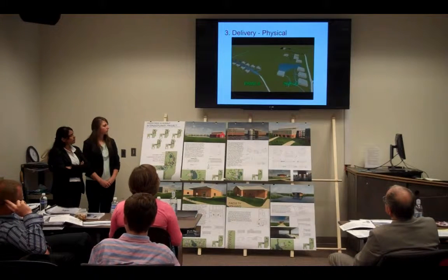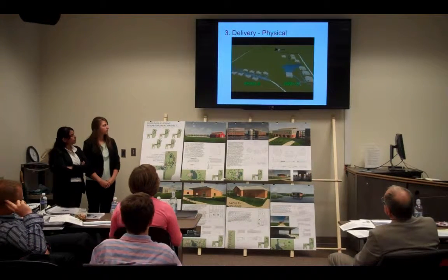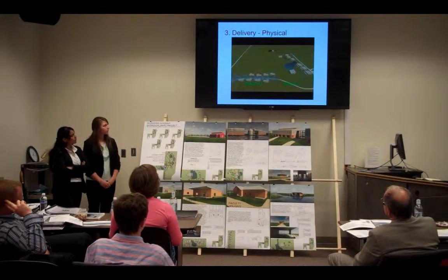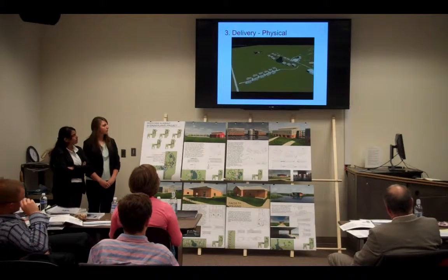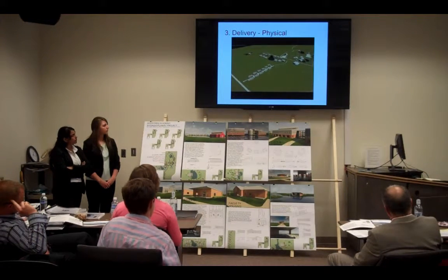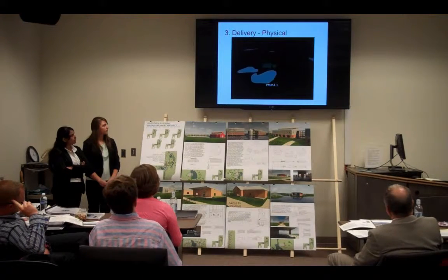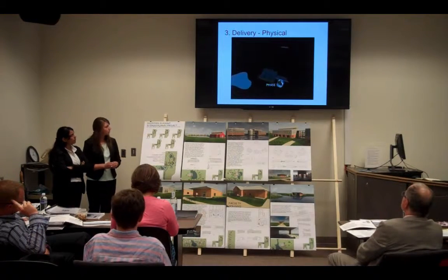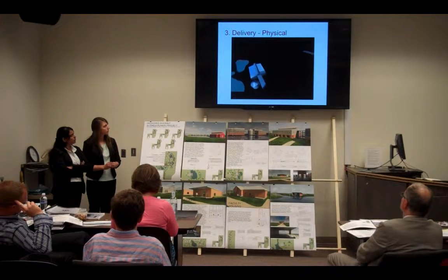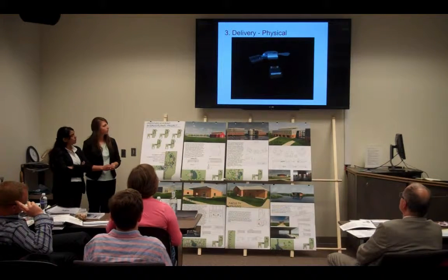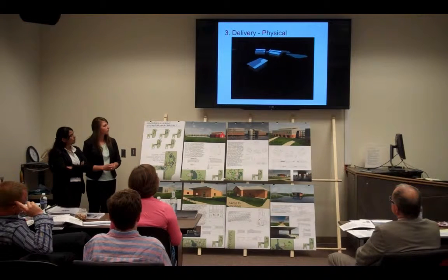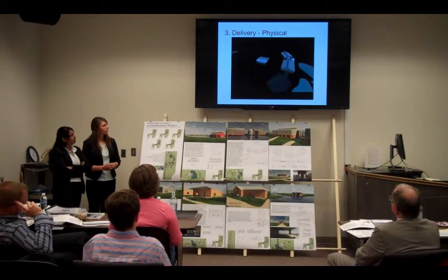The fourth phase consists of gym, student and staff housing. The fifth phase consists of student and staff housing. The academic building has 3 blocks connected to each other. The construction is phased out according to yearly requirements of the classroom in first 3 phases. The first block of the academic building is provided with the external elevator, which further allows access to the other 2 blocks. The library building is also being constructed separately in the second phase.